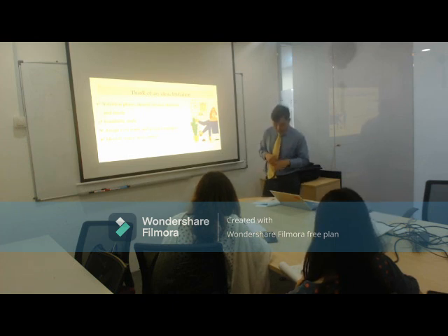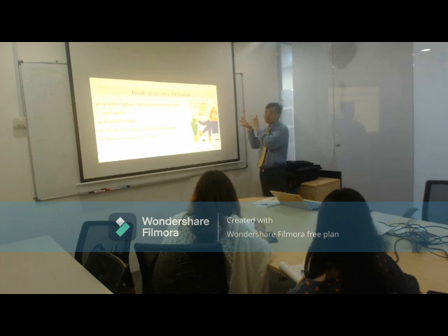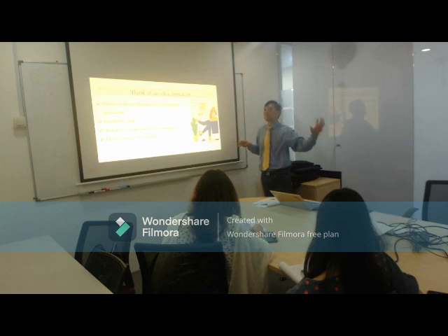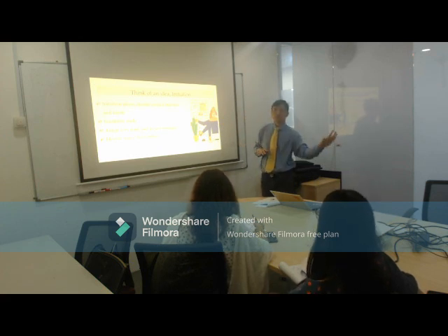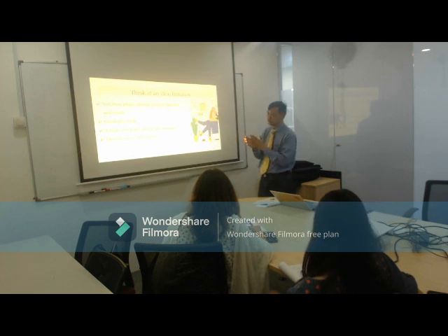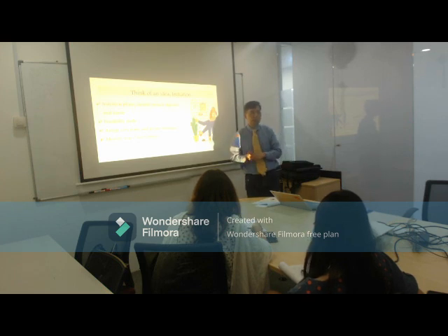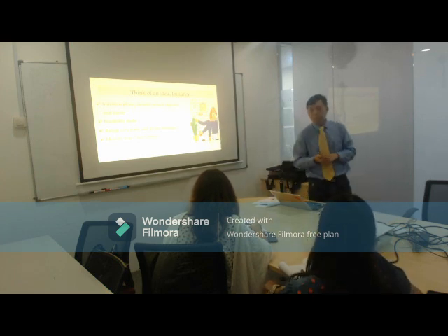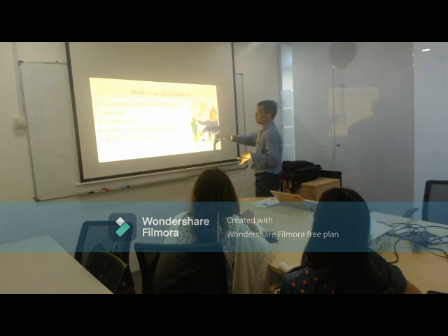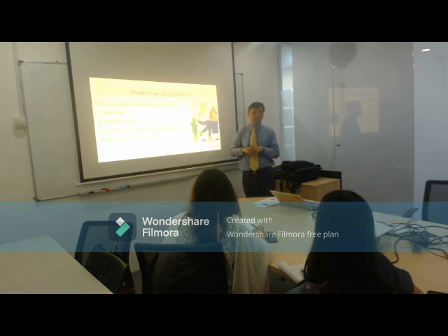One of the things in there, I will tell them the specific thing that I want them to do: the room must look beautiful with this shade of color, with this design and the pictures all drawn up there, and the furniture all placed back in the room. By when? Before Chinese New Year. So that would be the major deliverables.